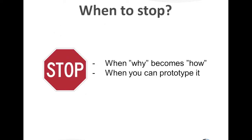So when do you stop? There are two stopping criteria. First, avoid going from 'why' to 'how' in the backlog — focus on putting in things where, if a player reads your backlog, they feel excited about it. It's not exciting to say we need to do some programming work — that's for implementation. The backlog should be value-driven. Second, avoid adding details when you can't prototype something yet, because otherwise you're just adding designs where you're still unsure of what's actually going to be out there.